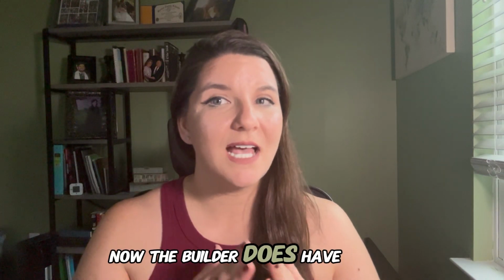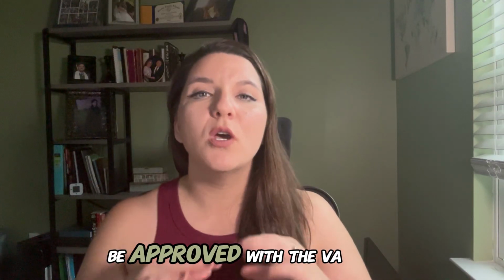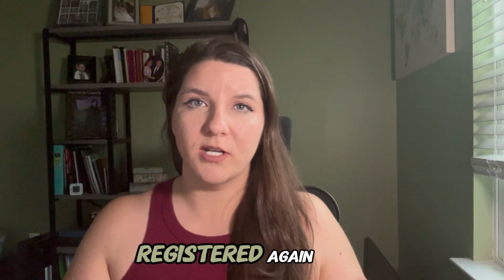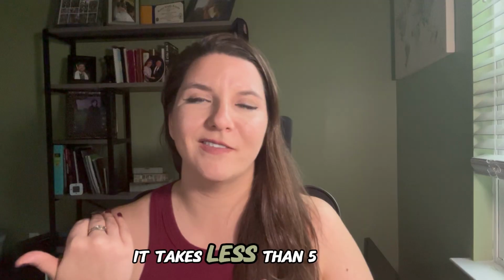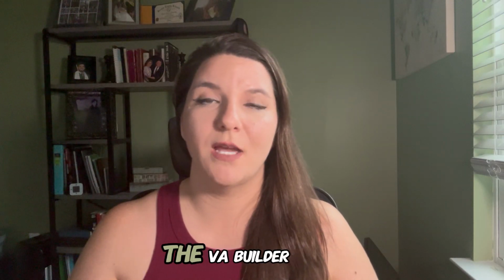Now, the builder does have to get VA registered. They do not have to be approved with the VA, meaning that there's not a vetting process, but there is a list that they need to get on. If they're already registered, woohoo, they don't have to get registered again, and we just verify with their VA builder ID. However, if they're not, there's about 3 documents, and it takes less than 5 business days to send that out to the VA to get registered with the VA builder.